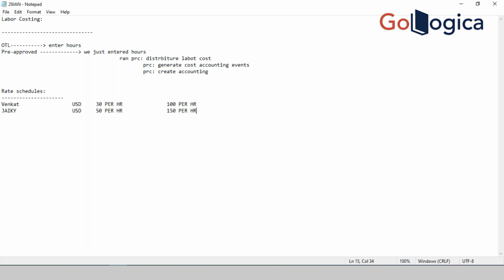In my case, say for example, one project called Cisco. My company Infosys will give me my CTC. That is a cost rate for Infosys. How much cost they're incurring? When they bill Cisco, obviously they'll charge more. That's the bill rate.